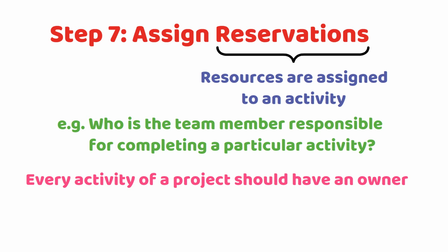When people take ownership of or responsibility for a task, they are more likely to ensure that it is completed on time and is of expected quality. So, including their names as contributors on the Gantt chart is useful. An activity can have multiple resources reserved. Similarly, a resource can be reserved for more than one activity.